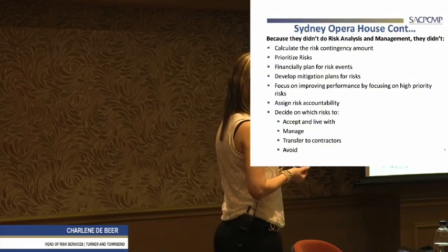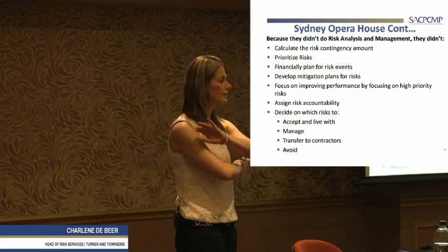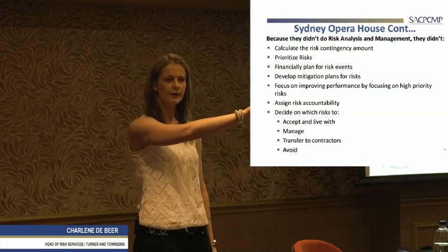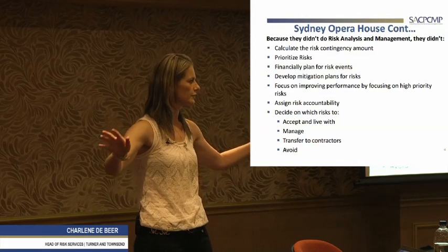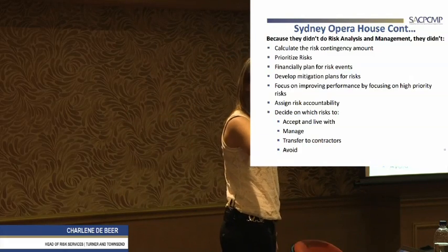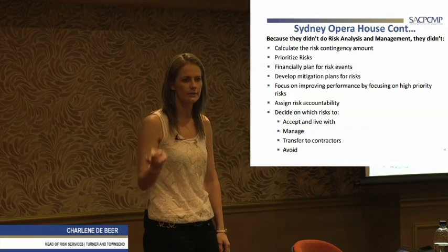Because the first thing, if you would ask a guy, what will you do? He will just say, we're not going to overrun schedule. We will throw as much money at it as we can. You don't know. It's not only South Africa who has power failures. Italy might have a power failure and then a little plant comes to a dead halt for 2-3 days, and there your contingency is already shot out the window, even if you've paid for it. It's not a guarantee that you will then still meet your date.